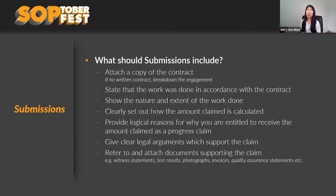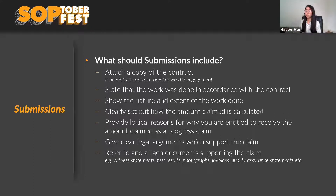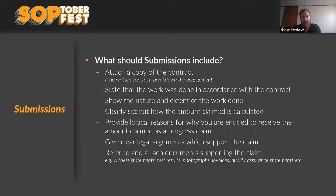If there are contractual provisions, refer to them. Provide logical reasons why you're entitled to receive the amount claimed as a progress claim. A common example is variations: a superintendent issues instructions to undertake additional works, there's a written variation order that's been signed, the works have been completed, and there's entitlement under the contract to be paid. That's a clear example where there would be an entitlement to payment.